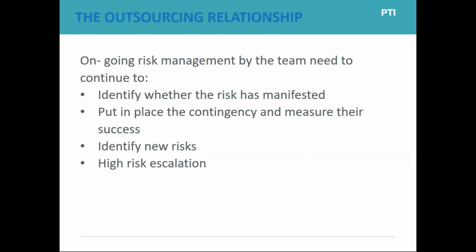And on top of this, your service provider will be doing risk management and working with you. Are you a sponsor that keeps changing their mind and keeps changing the scope of the project so that they're really not quite sure how to resource for it? Are you a sponsor that refuses to have any changes in scope even though you've asked them to go to 3 new countries? And is that a risk that the CRO is prepared to take or not, depending on what your contract up front was?